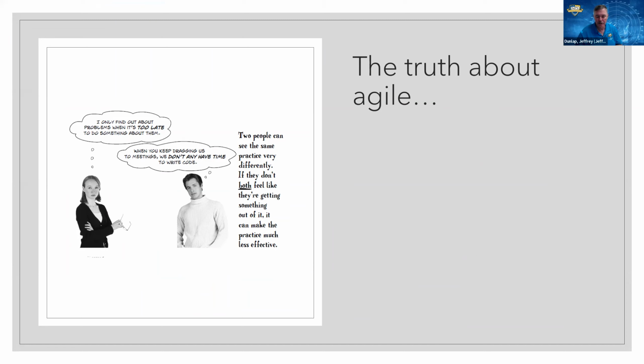As a program manager of several software intensive systems that were developed, I always got this feeling that I'm 2.5 years into the contract and I haven't seen any working software. I'm like, this seems really weird. And that's how waterfall sort of goes, right? They are coding this, they're working on it. And I'm like, how's it going? They're like, well, here's your earned value management. Do not do earned value management on agile systems or on modern software development. Earned value management requires you to do all the detailed design and know all the requirements in advance in order to set your baseline. You cannot do earned value management if you're going to do agile or DevSecOps.